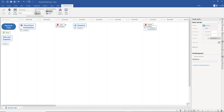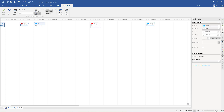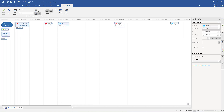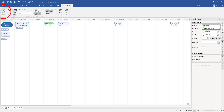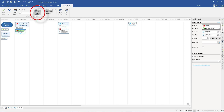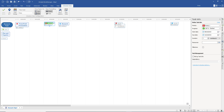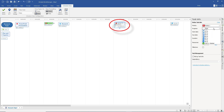I'll zoom out a little so you can see more of the timeline. You can print these out as well. The items I haven't added times to are sitting without dates, but the rest show the dates at the top to work from. If you've completed 'Notes' on your PowerPoint Presentation, you can select Mark Done (green). You can also toggle between Start date and Due date views at the top. For Research — internet — if you've only done half, select 50% progress so you know only half is done.